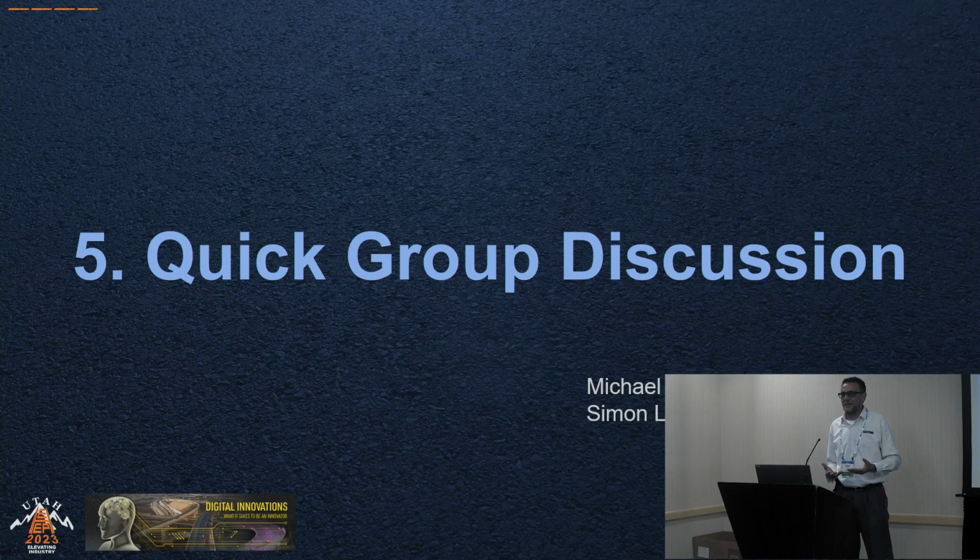They're huge. For the progressive design builds, I have 4 or 5 volumes of execution plans. Because if I gave somebody one big massive volume that's 1,000 pages, they're not going to read it. They're not going to focus on it. So we had to break it down into palatable pieces and chunks and bites, but explain all of that. So normally, Lance, I have to have meetings with the BIM team and the designers and focus on how to enhance and enrich this data so we get the full life cycle output.